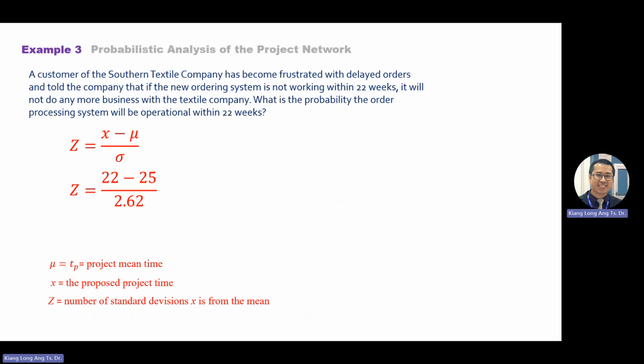If the question asks what is the probability that you are not able to complete within 26 days, this is the not-able side, or you need to spend more than 26 days. The question you should ask is, what is the probability that the project needs more time than 26 days? The probability that it needs more time is this line, right? Here. So you need to take 50% minus the probability here.